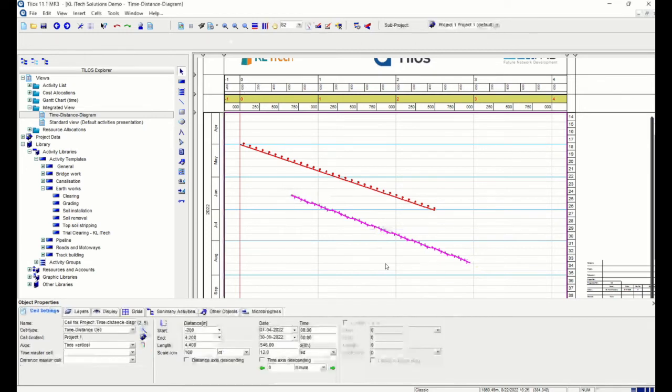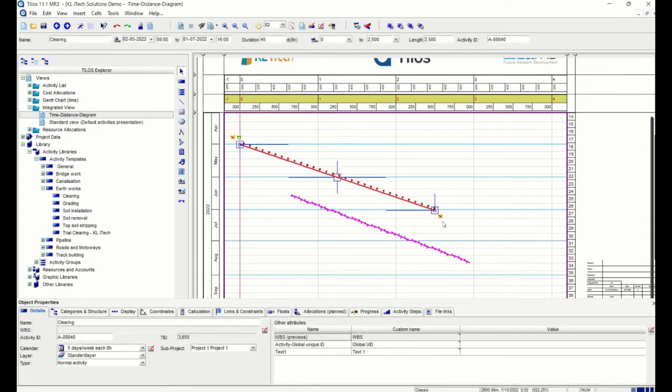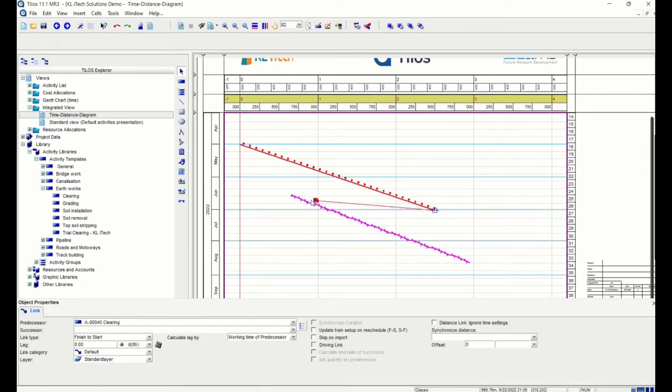Now, since we have two activities, how do we link the activities like a conventional planning tool? So you can select any one activity, and you can see there is a small yellow color tab with a red arrow available. So you can click on that, drag it, and you will see an anchor button when you touch the other activity, and you can drop it, which means that these two activities have been linked. I select this red color line, and you can see that this is the linking. So the predecessor and the successor is defined, and you can also see the link type is available.